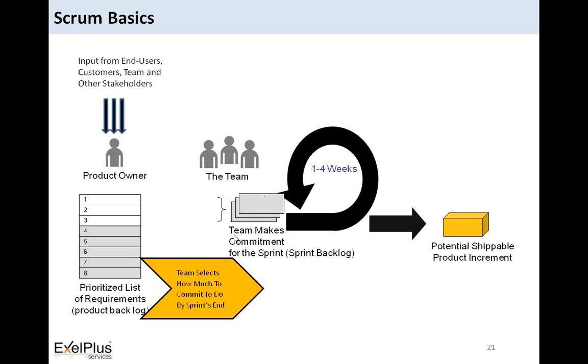They'll do iteration sprint planning at the beginning of the sprint, and once the sprint plan is ready, they start working, and at the end of the sprint they'll deliver working software, which will be reviewed by the product owner and his team. The product owner will review whether the team is adhering to his expectations, and if not, inputs are given to the team, which will be implemented in the subsequent sprints.